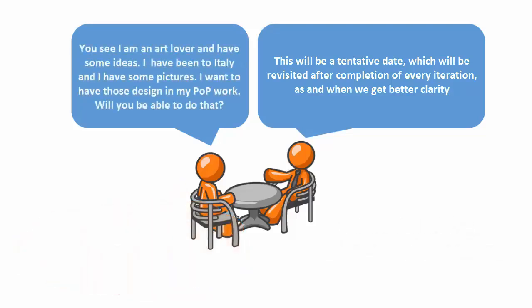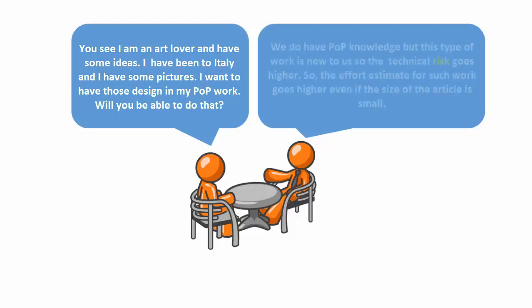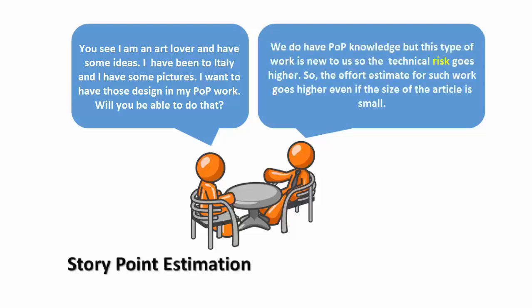You see, I am an art lover and have some ideas. I have been to Italy and I have some pictures. I want to have those designed in my POP work. Will you be able to do that? We do have POP knowledge, but this type of work is new to us, so the technical risk goes higher. So the effort estimate for such work goes higher even if the size of the article is small.